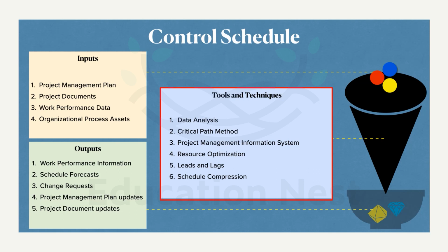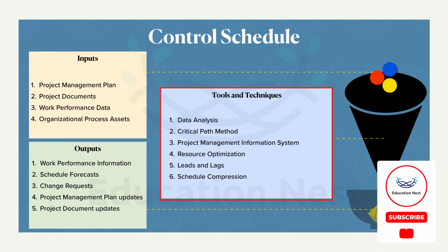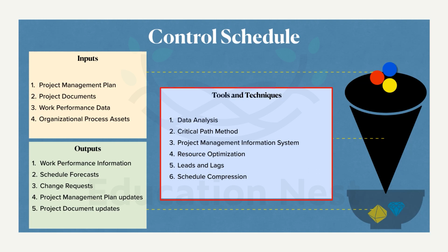I think I have also stated this there. So all those left out backlogs, if they are not included in any one of the sprints to come, will be left even at the end of the project, at the closing stage of the project, right? So at this closing stage, we cannot just close all that huge list of backlogs that are left, right? So it is important that somebody is tracking, or there is some mechanism tracking those backlog activities. So in controlling schedule, it is important that we look at all these backlogs. So a planned versus actual timeline is again drawn for these backlogs, and it will be tracked.